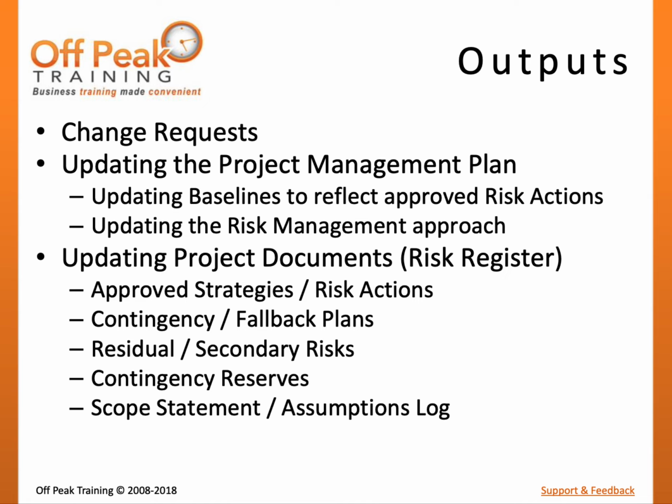Within the context of planning risk response, the risk register should be updated with the following: agreed upon response strategies, to include avoiding, mitigating, transferring, exploiting, enhancing, sharing, or accepting. Specific risk actions. These are the project tasks created to implement response.